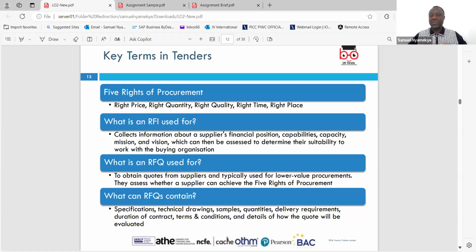Some of them say, oh, you can collect from my premises, that is EXW. Then there will also be CFR, cost and freight, and CIF, cost, insurance and freight. So a whole lot of Incoterms need to be clear. This is how we want it: we want it delivered to us, or when it's ready, leave it and our forwarder will collect it. So that should be made clear.